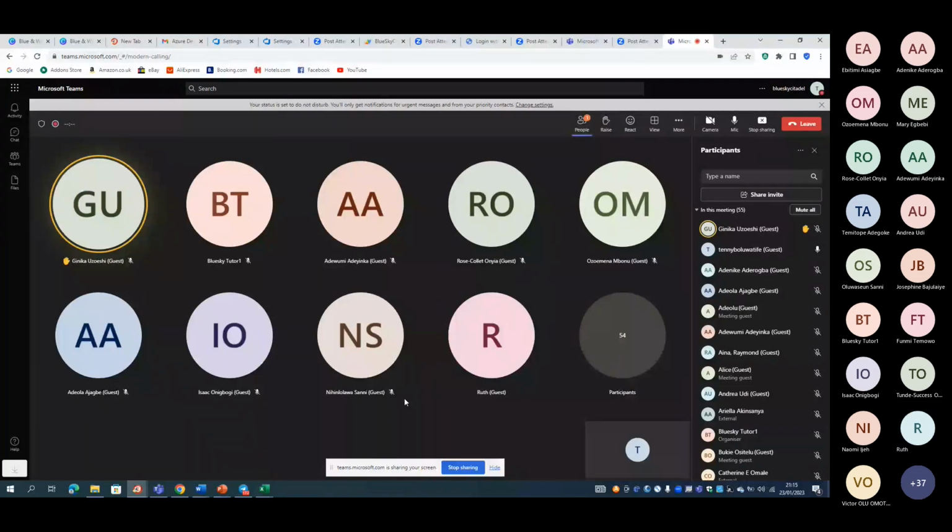It's incremental. But in waterfall, you gather all the requirements at once and you document everything in your BRD in very big documents, and then people will go from that point. That's the difference. For Blue Sky, your PO and you guys will gather requirements sprint by sprint, because you are just starting out, so we don't want to scare you guys.